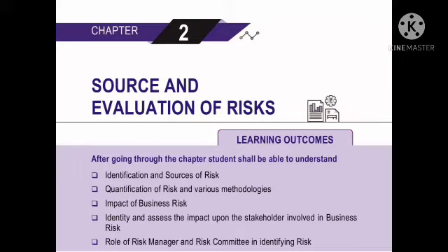Here, a panel of experts is appointed. Each expert gives his/her opinion in a written and independent manner. They enlist the estimate of the cost, benefits, and the reasons why a particular system should be chosen, the risks and the exposures of the system. These estimates are then compiled together. The estimates within a pre-decided acceptable range